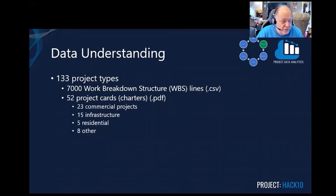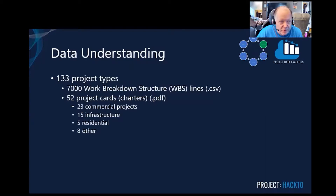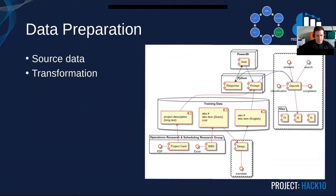The data we used for this project consisted of 133 project types, with 7,000 work breakdown structure lines that we used to train our model, and 52 project cards or charters that we used to validate our model. Project descriptions and WBS were taken from the Operations Research and Scheduling Research Group website. The WBS descriptions were in Dutch, so these were translated into English using DeepL Translate.